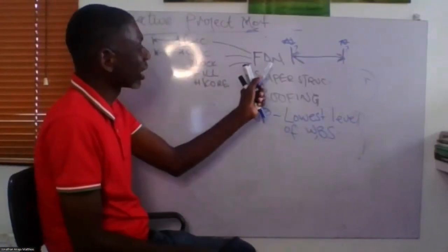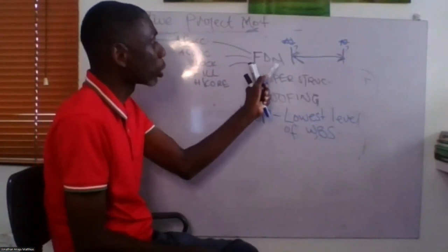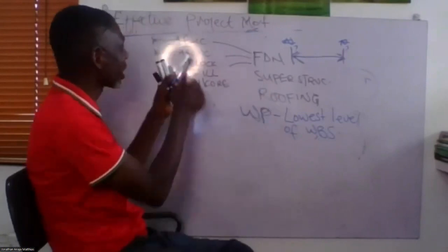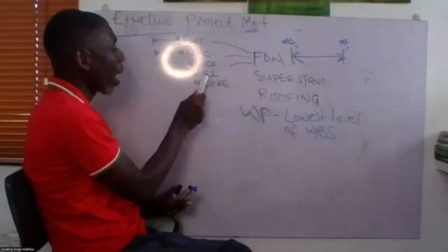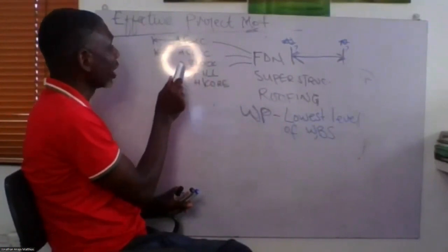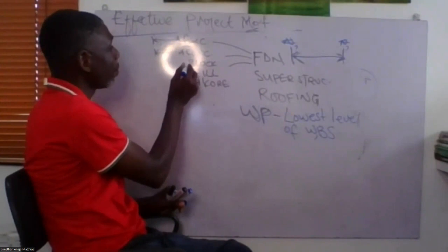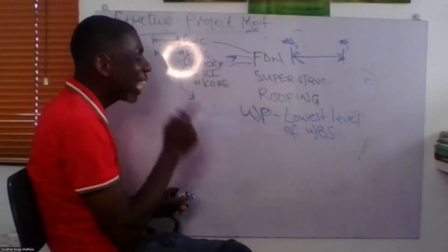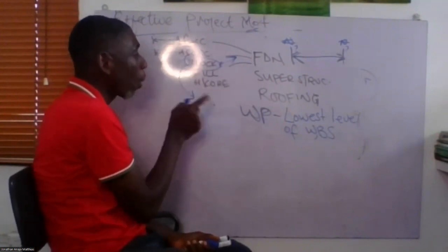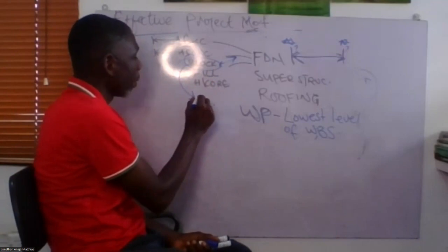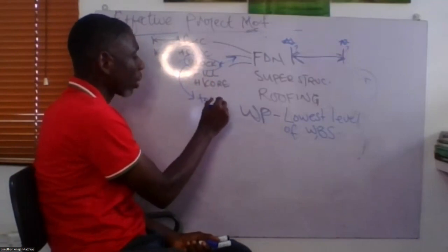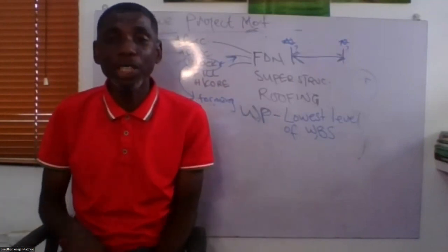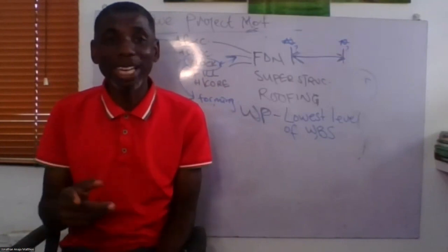If Mr. Wesley wants to estimate the cost and duration of foundation, it will not be as easy as estimating each of the sub-activities. If he discovers that he's even unable to estimate block work as a sub-activity of foundation, he may need to further break the block work down. On site they call it forming, because the first course that they form on the ground, where they need to square all the angles and all that, takes longer time.